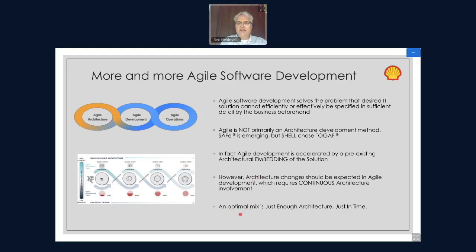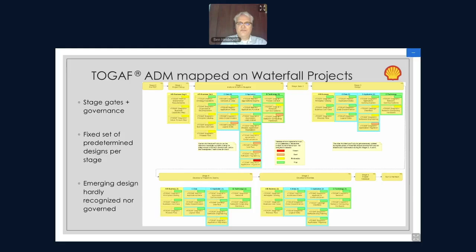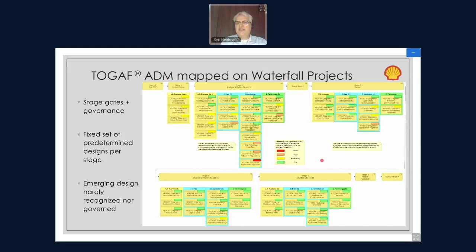We basically find that it is possible to do just enough architecture just in time. This next slide, though it's unreadably small here, maps all of the TOGAF deliverables that are in the architecture contract over the run period of your project. This is a waterfall project shown at stage gate number two, but let me go to the next slide where it is a little more zoomed in.